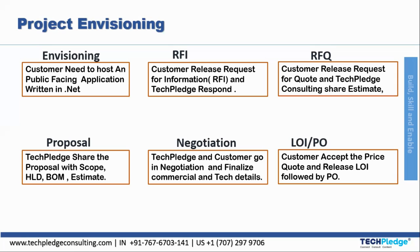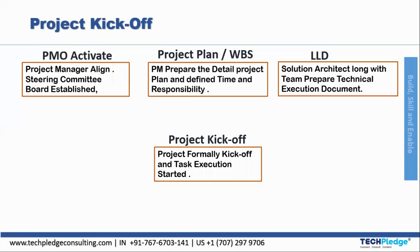After the proposal is validated and successful, TechPlace moves to the negotiation table. After that comes the Letter of Intent or Purchase Order. The Letter of Intent is where the buyer expresses interest in hiring the seller — it is not a contract but only an indication so the seller can start preparatory work. A Purchase Order is where the buyer awards the contract to the seller. In the Azure project, the customer accepts the quoted price and releases the LOI followed by the PO.